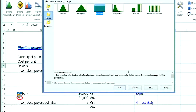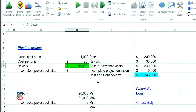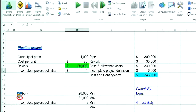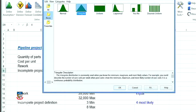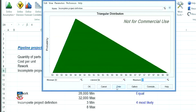I might select the rectangle distribution and I am then asked to specify the minimum, which I determined to be $28,000, and maximum, which I said was $32,000. When I hit enter and OK, we now see that it has been highlighted. Now I do the same for the second variable, risks or contingency. This time I might select a triangle distribution and then specify the minimum of $3, maximum of $8, with most likely set at $4. When I hit enter and OK, the triangle distribution skews out to the right.